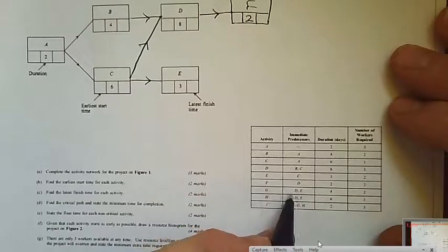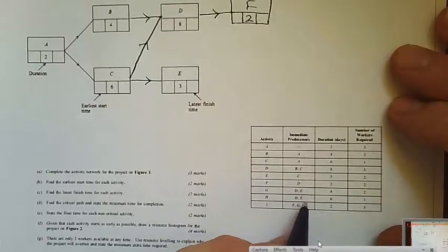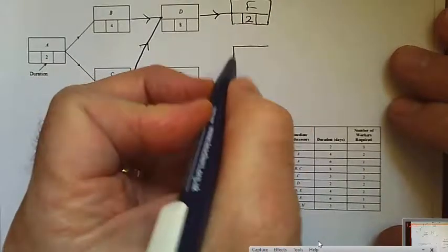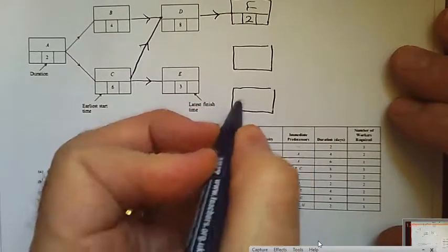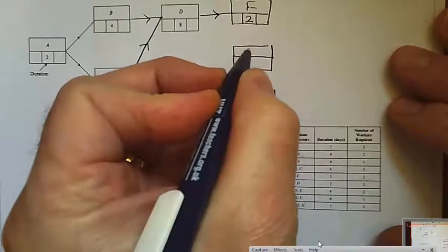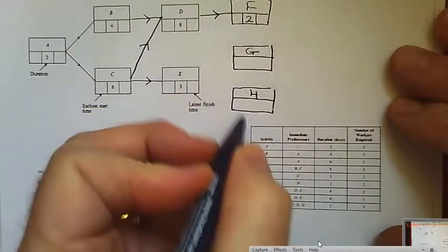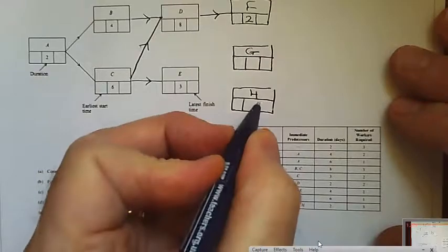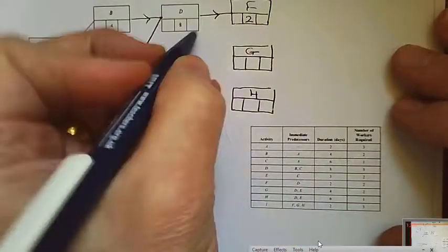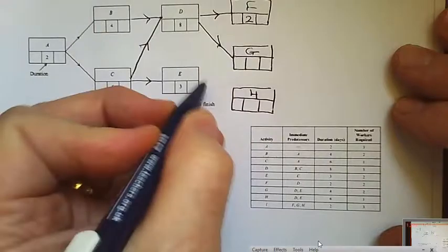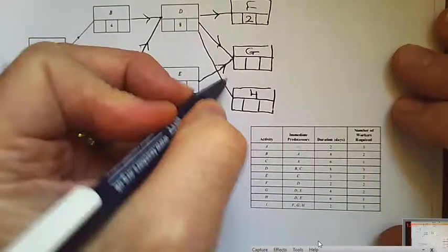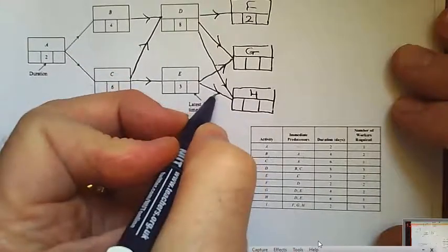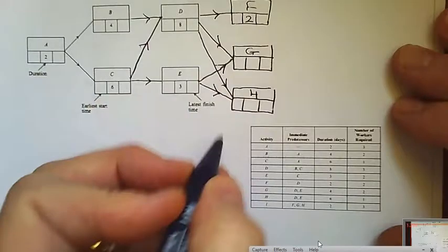If we then draw G on, well, G is preceded by D and E, and actually looking down so is H, so we put those both there, G, H. Both preceded by D and E. So we can't really avoid these 2 lines crossing.